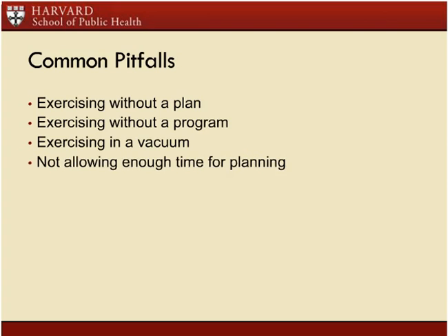It is common not to leave enough time for planning. I've already mentioned that, but full-scale exercises can take a year or more to plan, and even tabletop exercises oftentimes take months. And you've got to leave enough time for planning to make sure that all the right partners are at the table, the right level of seniority, all the appropriate details of exercise planning are attended to. You can't have too many objectives.